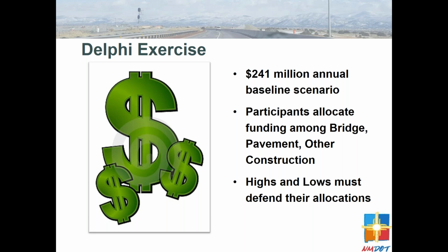Because there are always those needs where you get some of those major investment projects that one particular district might not be able to afford that project within their given funding allocation for the year, and then they're having to either make the project smaller or split the funding amongst adjacent federal fiscal years in order to get it developed.